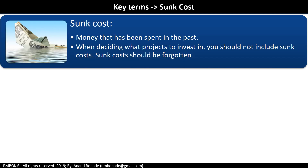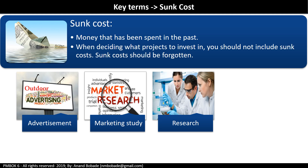Sunk cost is money that has already been spent in the past — for example, advertisement cost, marketing study, or research cost. This concept comes from early days when traders used ships for trade; once the ship sailed into the deep sea, it was considered a sunk cost until the ship returned to shore. A key point to remember for the exam: when deciding which project to invest in, you should not include sunk costs. Sunk costs should be forgotten.